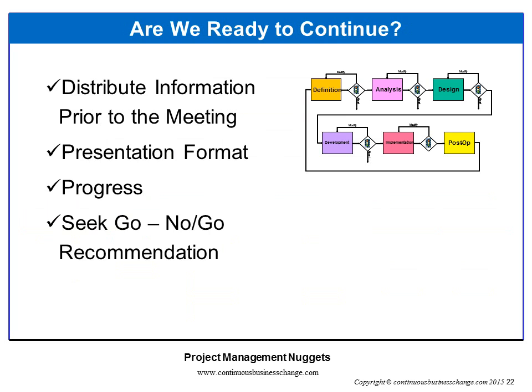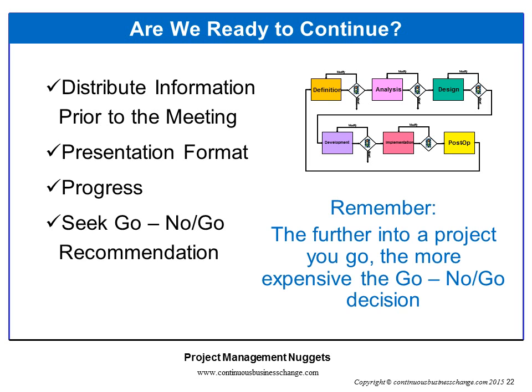There is a go, no-go decision at the end of each phase. The purpose is to ensure agreement on the work accomplished and the work coming up next. It's also an opportunity to acknowledge and validate any business changes that may have occurred. The overarching principle is to do a little work, gain agreement. Do a little work, gain agreement.